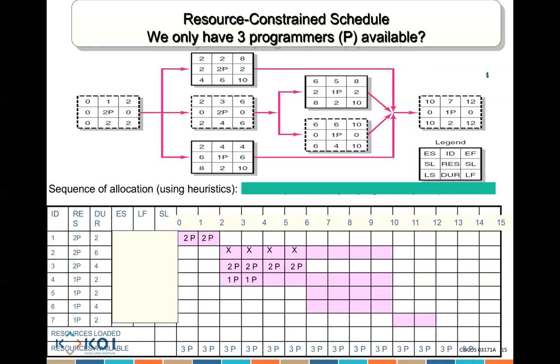No worries, Jake. Let's go back for a second. You understand that we need to do things in parallel? Yes. You understand that we start with things that have 0 slack? Mm-hmm. And this activity requires 2 people, it needs to start on day 2, and because it takes 4 days, it needs to finish on day 6. Do you understand that? Yes, based on our last activity. Correct. So because of that, we need to start activity 3, and we need to write 2p, 2p, 2p, 2p.